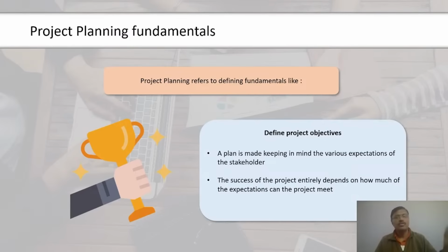And in the third column, we have the duration or tenure of the task. The second step is to make a bar chart in Excel. For this, we will select the entire second column. Then we will go on the Insert tab and click on the bar graph chart. There, we can select Stack Bar Graph into the bar charts. As a result, we will have the entire bar graph on the screen.